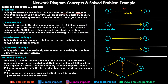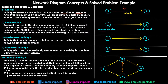The second concept is an Event or Node. These blue circles are events, also known as nodes. An event represents the start and end of an activity and does not itself consume any time. You can think of it as transitioning from one state to another — whenever you perform an activity, you move from one node to another.